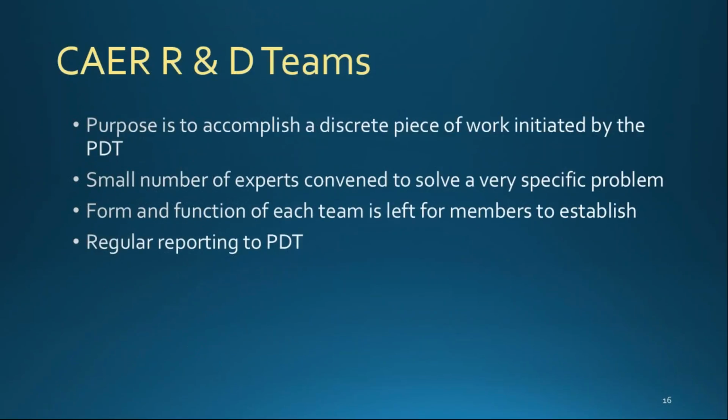This next slide covers the teams that are going to be doing the work. They're going to be the ones that make CARE a success, and they're going to make CARE a success in manageable chunks, if you will. We foresee them being small teams, 3 to 5 people, as I said, probably in increments of up to 3 months.